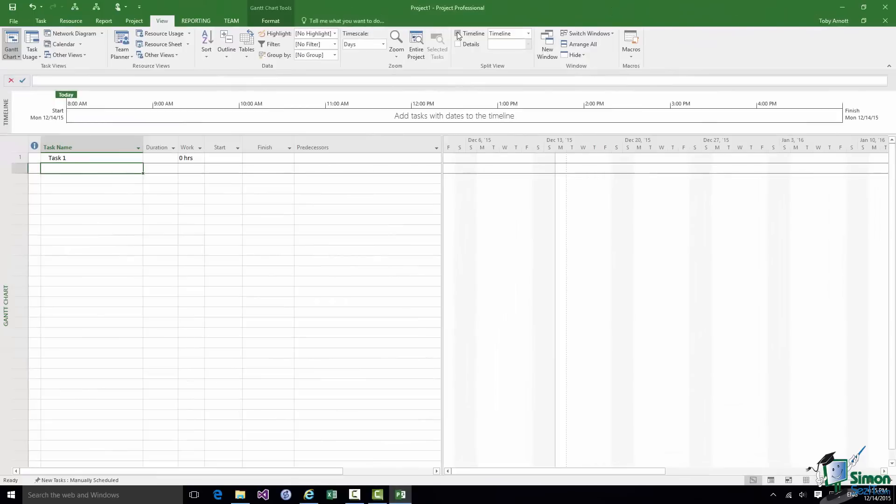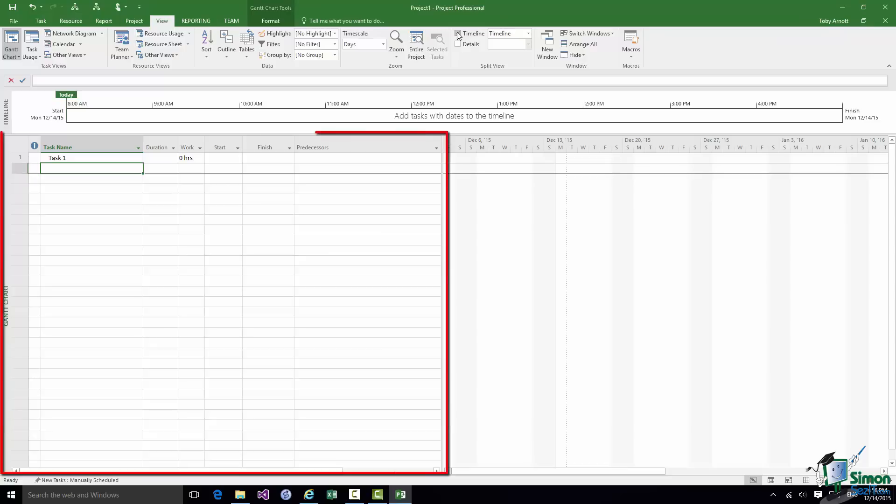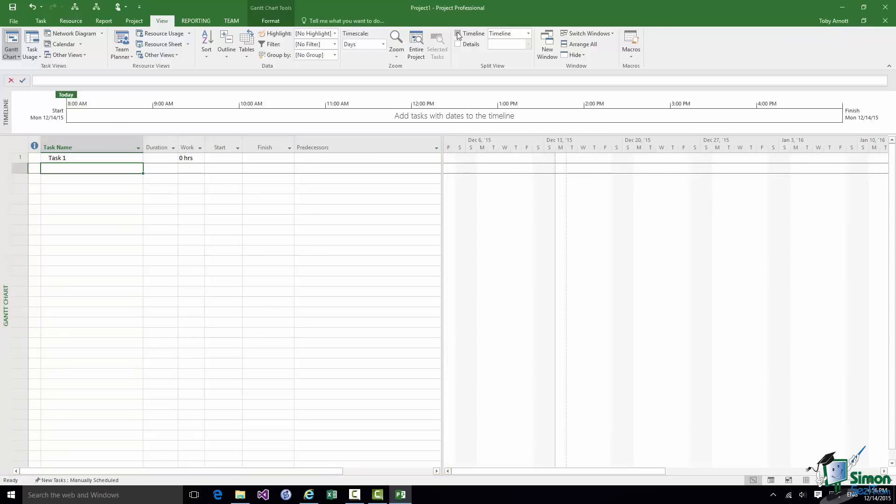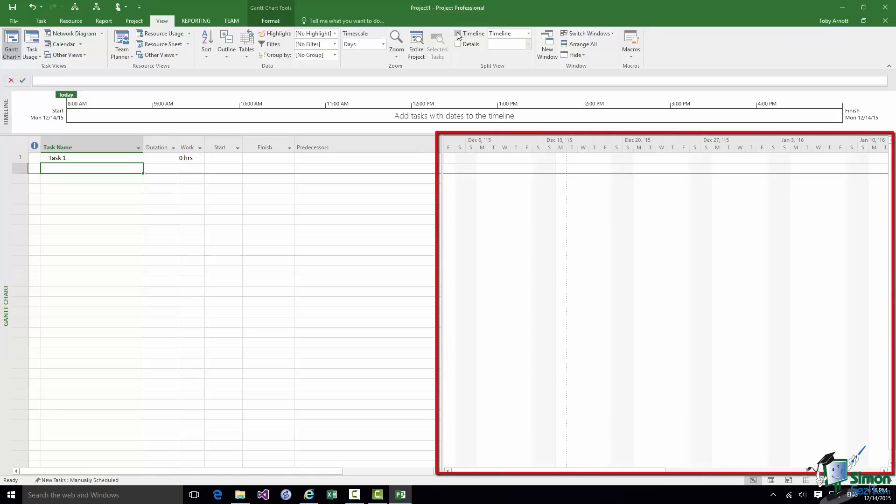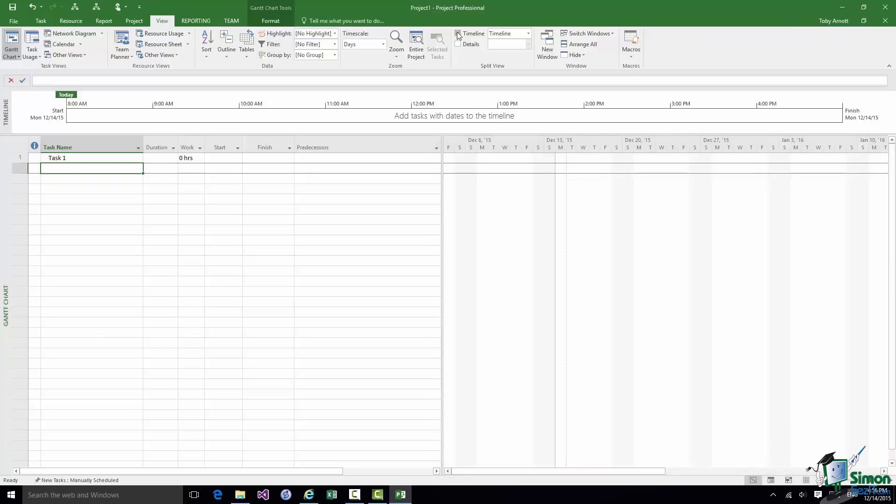Below the Timeline is the main project window. And by default on my installation I show a Gantt chart. And the Gantt chart actually comprises two parts. It comprises the list of tasks. It's actually a table and we refer to this as the table. And on the right we have the chart itself which is normally a pictorial representation of the tasks in my project. Now you may or may not have a Gantt chart shown. If you don't have a Gantt chart shown you'll soon find out how to show a Gantt chart there. And there will be situations when you'll want to see one of the many other types of chart that you can show in the main body of the display there, the main window.